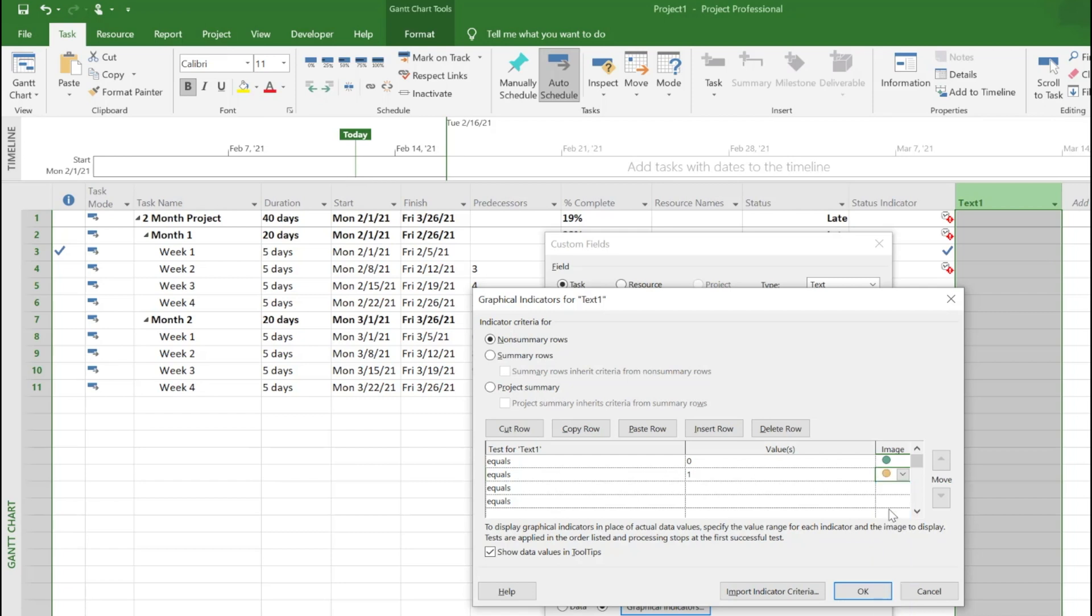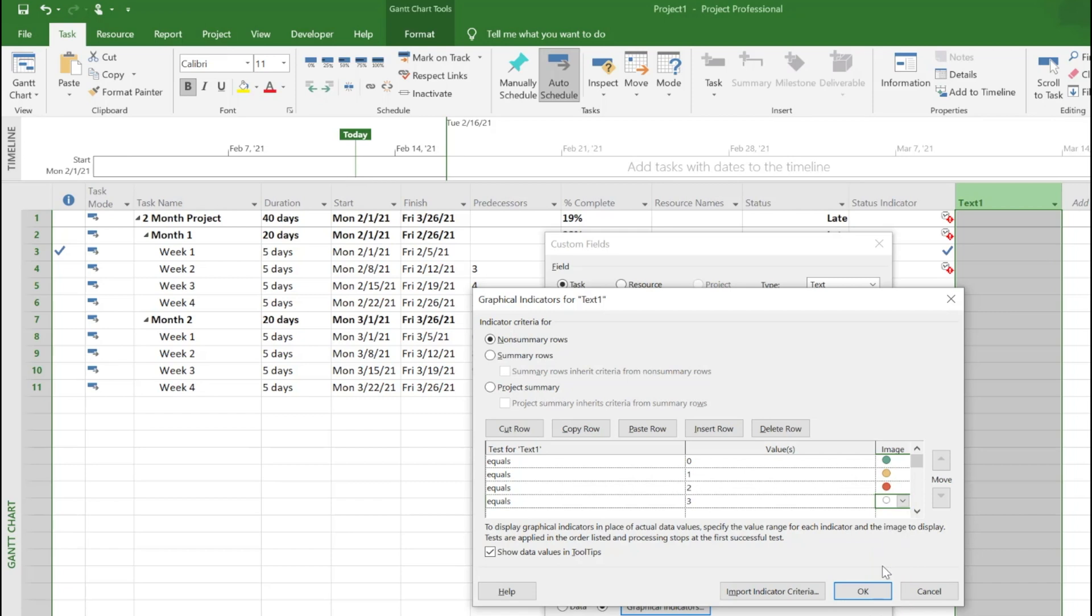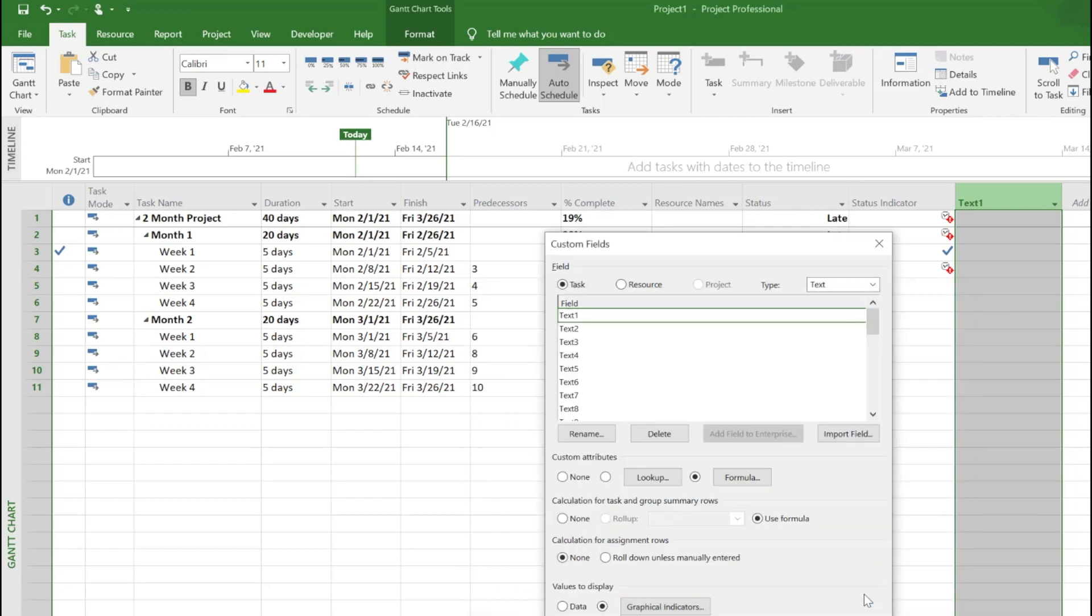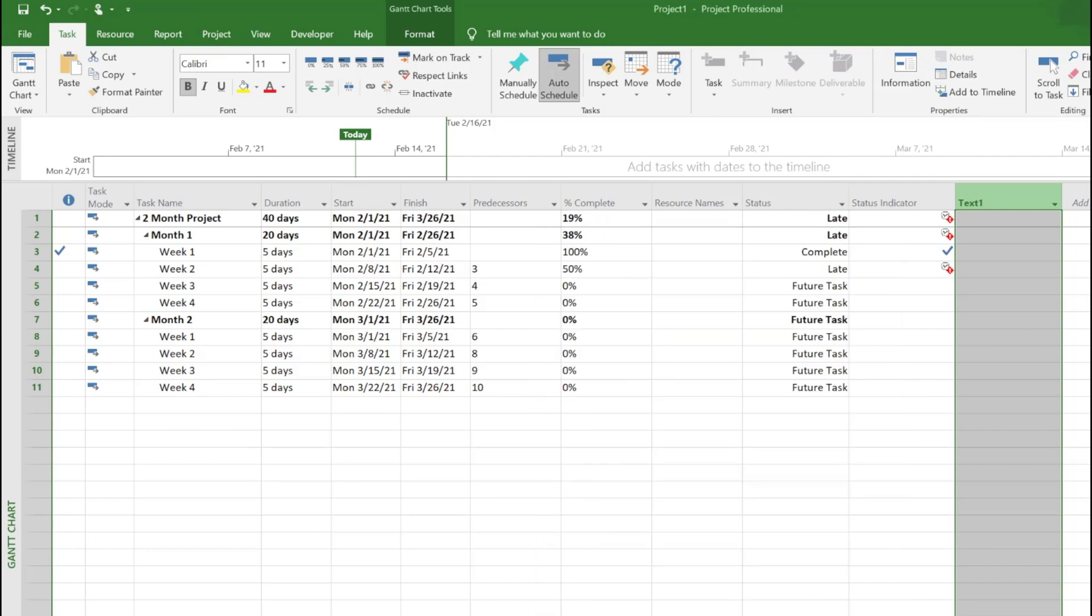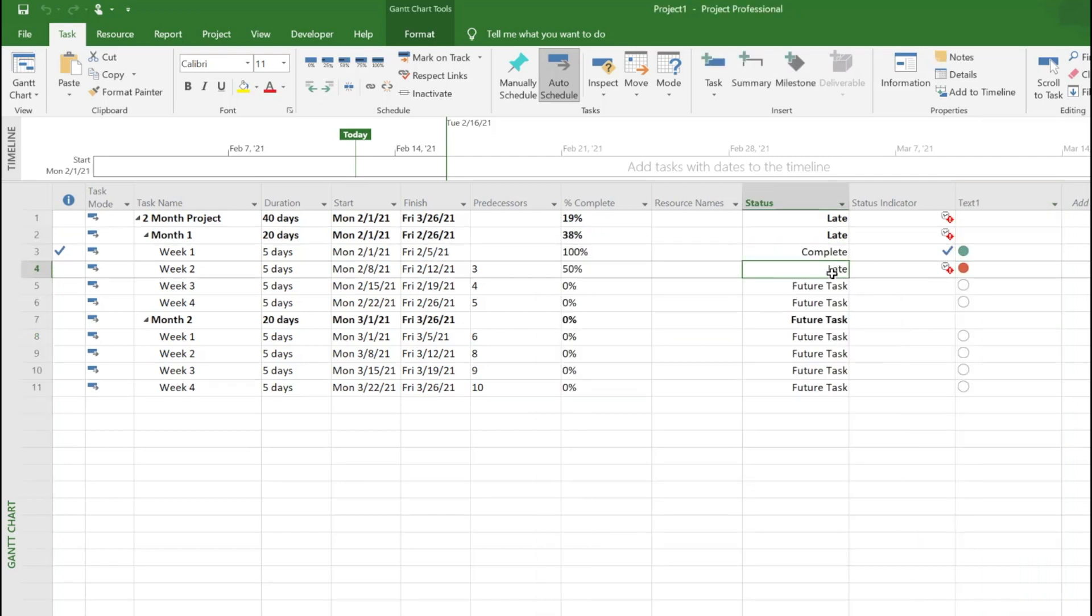One means it's on track or on schedule, then we want to show that as upcoming activities with amber. Number two is late, so we want to show it as red. And number three is future task, so no color.